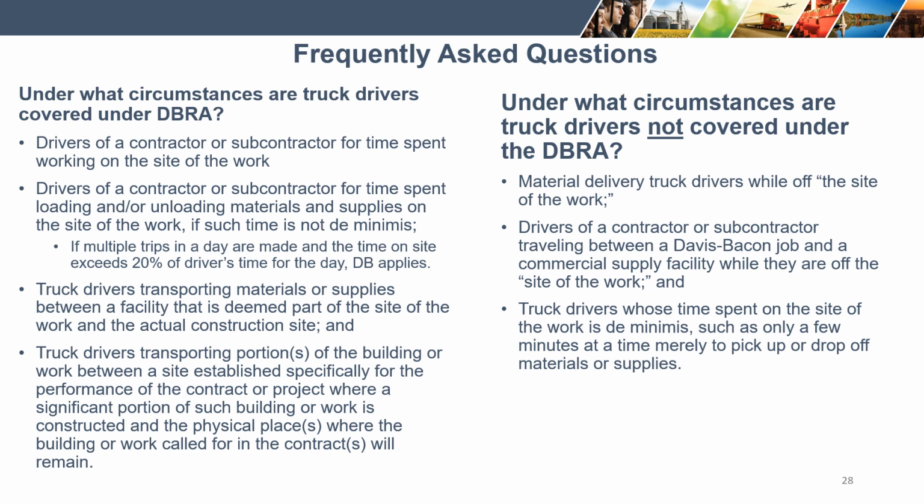Truck drivers transporting materials or supplies between a facility that is deemed part of the site of the work and the actual construction site, and truck drivers transporting portions of the building or work between a site established specifically for the performance of the contract or project where a significant portion of such building or work is constructed, and the physical places where the building or work called for in the contract will remain.